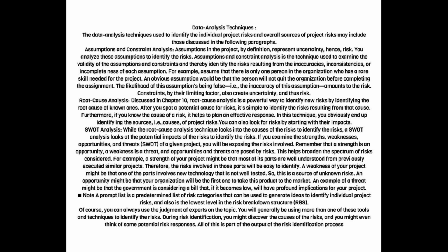For example, a strength of your project might be that most of its parts are well understood from previously executed similar projects. Therefore, the risks involved in those parts will be easy to identify. A weakness of your project might be that one of the parts involves new technology that is not well tested. So, this is a source of unknown risks. An opportunity might be that your organization will be the first one to take this product to the market. An example of a threat might be that the government is considering a bill that, if it becomes law, will have profound implications for your project.